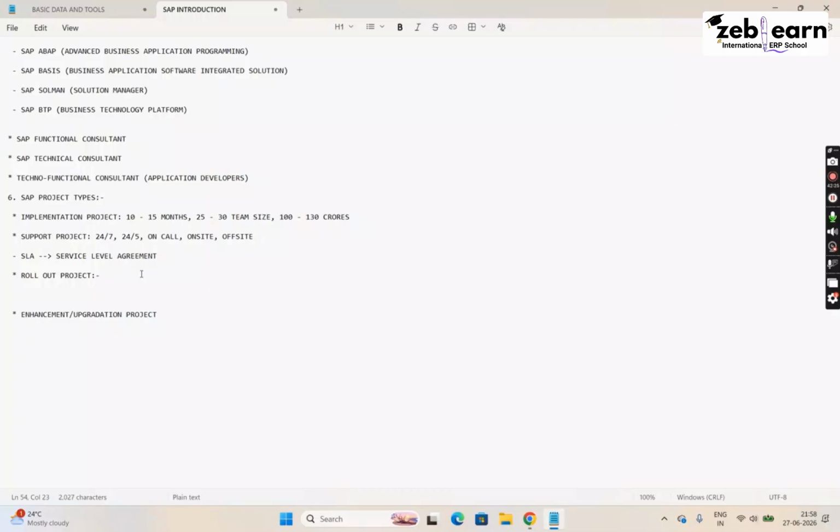You are not going to do that, because it will take a lot of money. And where will you go? If there are 4 locations, it is difficult to manage. So therefore, maybe you will start in one location in Hyderabad. After you complete that construction, then you will start in Bangalore, then you will start in Pune. It is something like that, very similar. So such kind of a project is called as a rollout project.